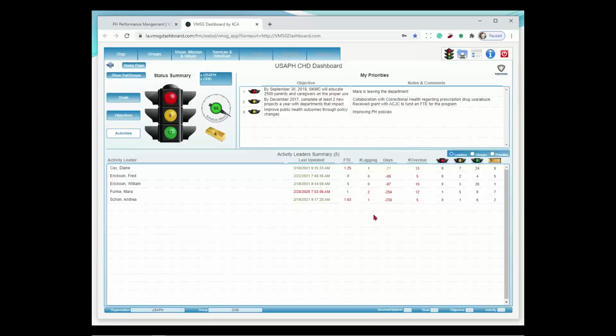And obviously, if you have a beginning date, ending date, and a percent complete, it's easy to calculate whether you're on schedule or not. And it's color-coded as to how far. The days is the same as the schedule gauge up here, but for the individual person. So how's each person doing against their assigned schedule? Overdue is just that. Ending date is come and gone. We're not yet complete. And then the number of red, yellow, green, and gold for that person. So just by looking across one row, you get a great snapshot of the performance of that person, which is really key.